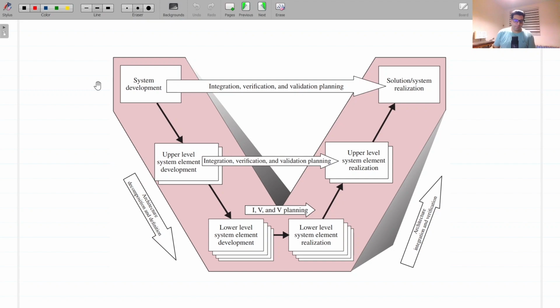assurance, while process improvement focuses on increasing process capability through standardization, measurement, and control. These methods rely on the master plans to anchor their processes and provide project wide communication. Well, historical data is usually carefully collected and maintained as inputs to future planning to make projections more accurate.